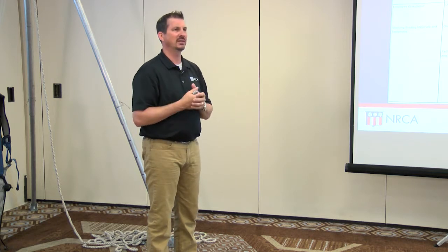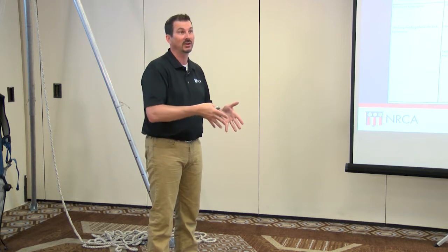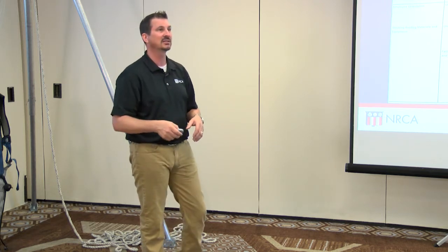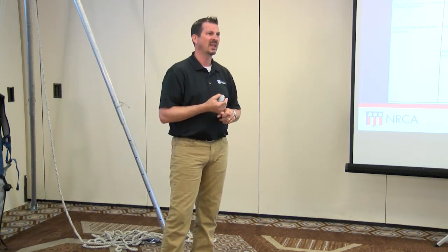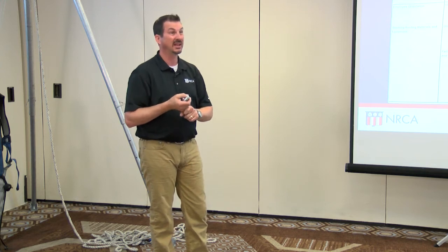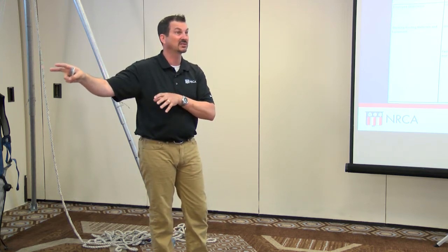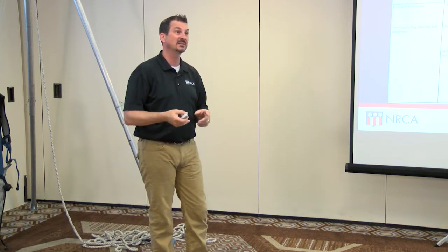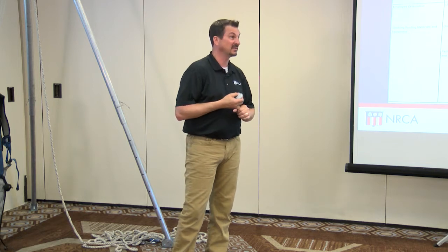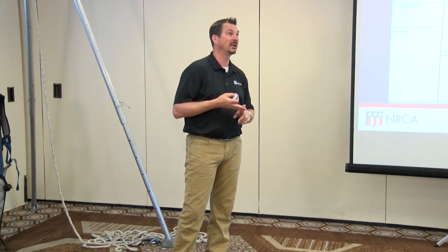But what if we can't do any of that? What if we can't figure out how to solve or fix that problem right there on the job site? That's when we go to the 4th section in this job hazard analysis, and that's the contingency plan. Have a backup plan for everything. It can be as simple as taking it out of service and sending it back to the shop for maintenance to do those simple fixes or repairs. Or in some cases, it could be contacting your safety director, or in many cases, depending on the type of hazard and what actually occurs, it could be calling 911.